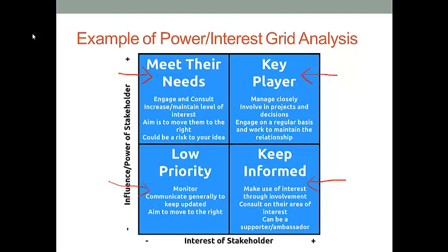As long as we pay for the advertisements, this agency may not care about our sales performance so much. They don't influence our decision-making process either. For this stakeholder group, instead of using a fixed payment, you may consider using a commission-based payment for the advertisements, so that you can use the agency's interest as an incentive for developing a better advertisement plan. This is an example of how to use the power interest grid analysis to identify different stakeholder groups.